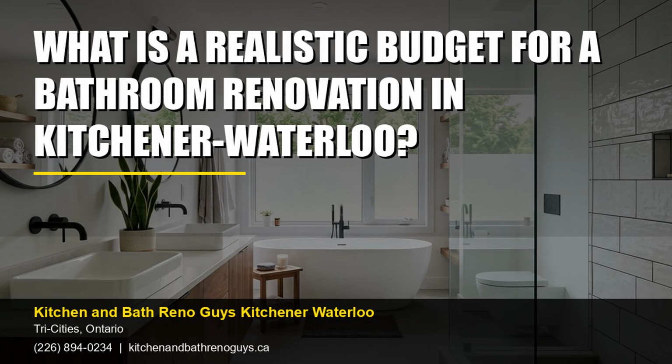Explore local suppliers in Kitchener, Cambridge, and Waterloo for materials to potentially save on shipping costs. Set aside a contingency fund of about 10 to 15% of your budget for unexpected expenses. Prioritize essential upgrades, such as plumbing and electrical systems, to ensure safety and functionality. Budget-friendly tips for Kitchener-Waterloo homeowners.